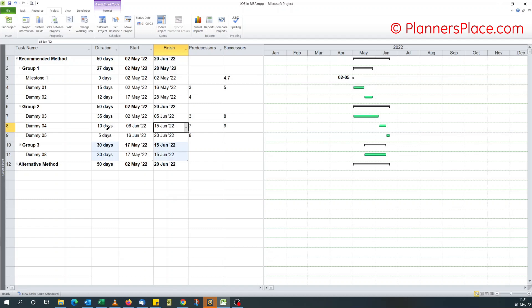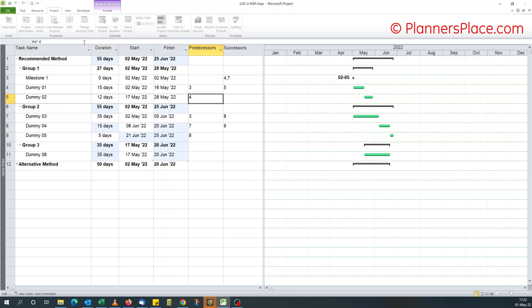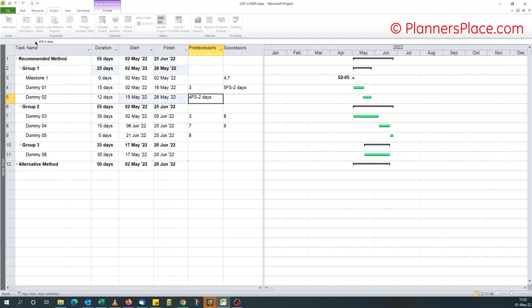If you increase the duration of dummy four, let's say increase this to 15 days, you see this automatically changes to 35 days and the finish date is aligned to that. And if you change the start date for dummy two, let's do a FS minus two and change to the 15th, this changes to the 15th automatically.